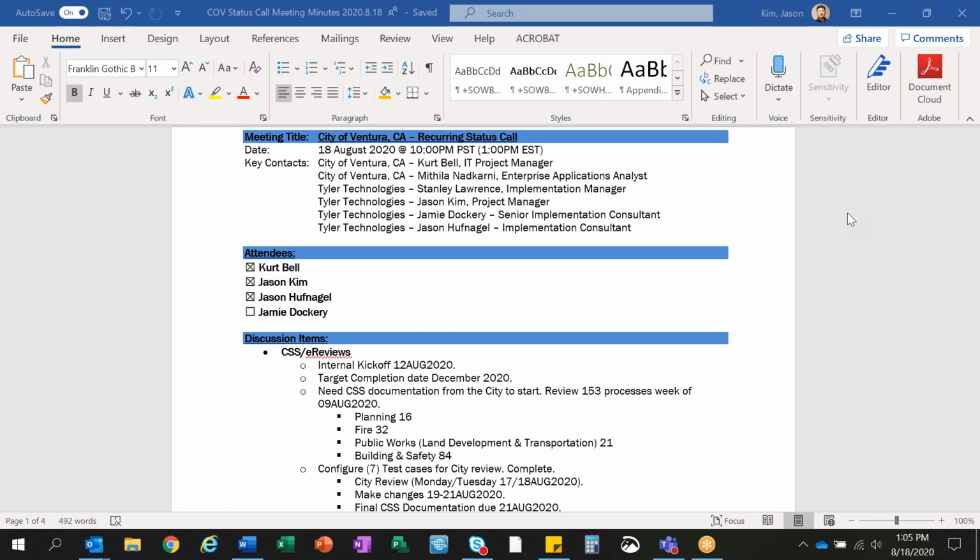But now that we've locked down all of the configuration, of course I'm speaking to the choir here, right? Now that we've locked down nearly all the configuration, making such a change because it doesn't translate well into CSS is problematic. We don't want scope creep as a result, but we do want to recognize that there may be things that don't work the way we want them to. It may not be as pretty, maybe some of it's cosmetic, some of it may be functional, and we actually do require a change order. But I just want to plant that seed in the steering committee's head so that they don't look at such things in the next few months as failures, but rather as consequences of the way that this was done.